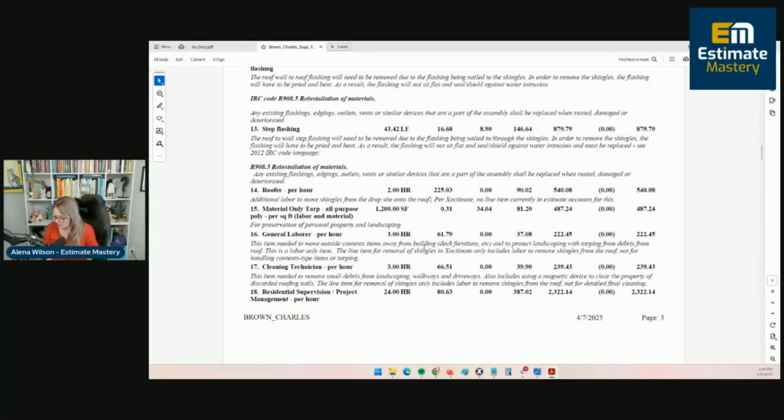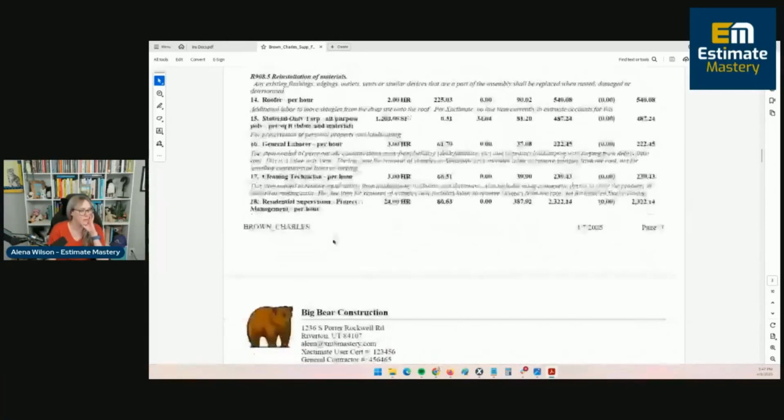When the adjuster doesn't want to pay to protect anything, I always bring up, well, we can go ahead and do the job as prescribed, but if we don't protect, we're going to have damage, and then you're going to have to pay for the damaged Japanese oak in the front, next to the front door. Is that really what you want us to do, not protect the property? So that helps with that argument. They do like to say cost of doing business for some of these things, but if we don't ask, they can't say yes. And I only advocate asking for legitimate and required line items. So that's usually what we add here at the end, just to round that out.